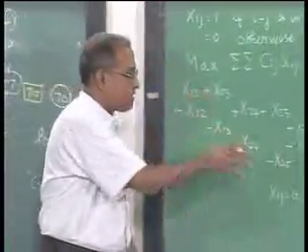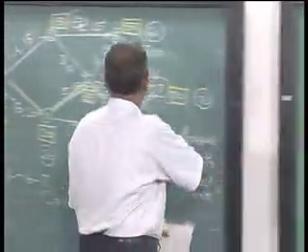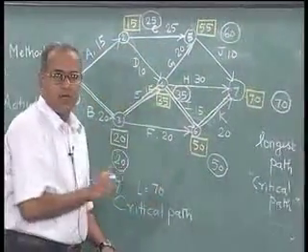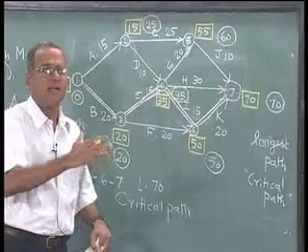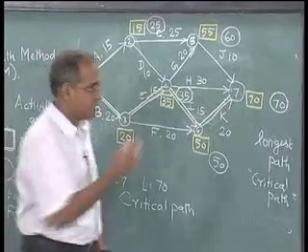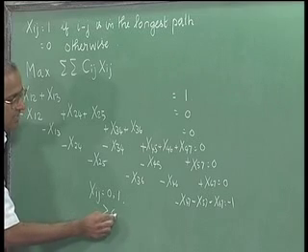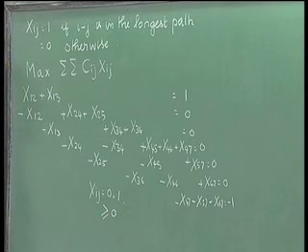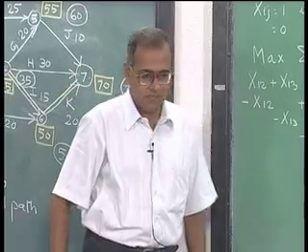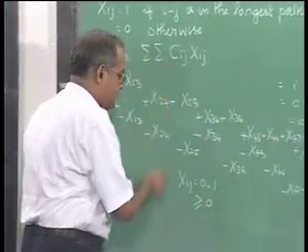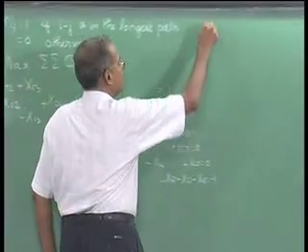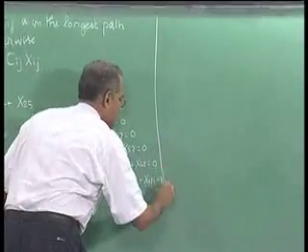So, the longest path problem, the way it is represented on this kind of a network where you have arcs from i to j, j greater than i, is unimodular, and therefore, we can treat this xij to be greater than or equal to 0 and solve the resultant linear programming problem, which would give us the optimal solution to this.